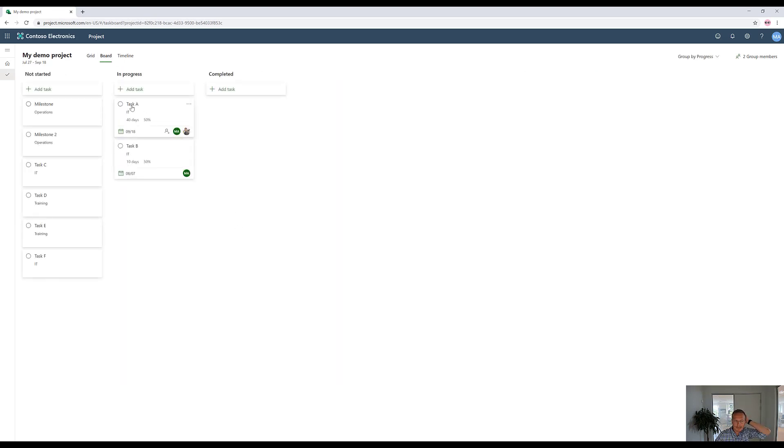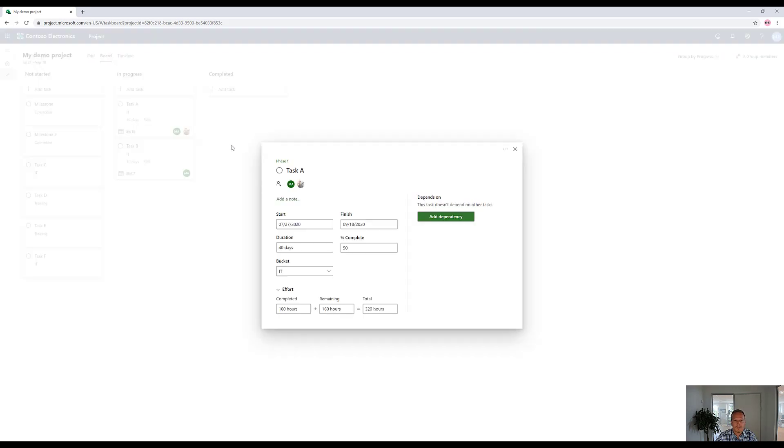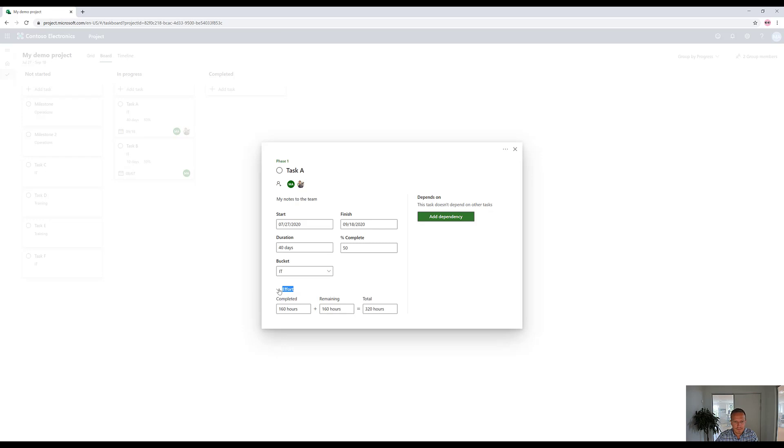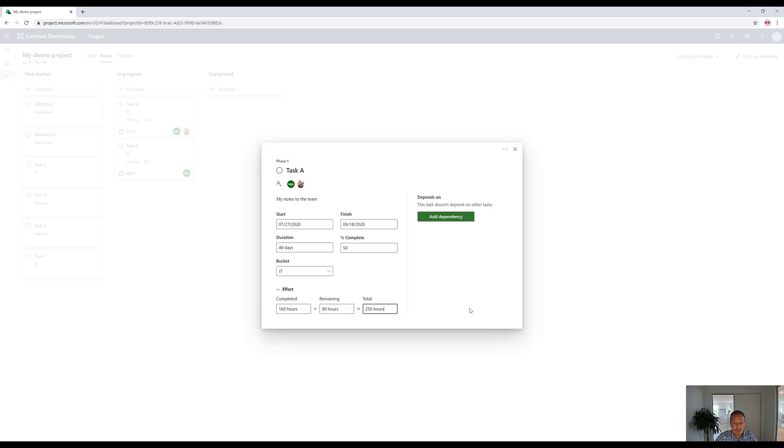Besides that, we can click on these tiles, which opens up this view, where we can also add some notes. We can also change start and finish date, duration, and also see the effort, which is, again, something you cannot do in Planner. That's one of the biggest differences between Planner and Project for the Web, is that here we have the hours dimension. So here I can say, well, we're 50% done, but actually it's 160 hours, but remaining is actually 90 hours. So in total, that's 250 hours. So here we can change those things and still have percent complete staying where it is, if you wanted to.